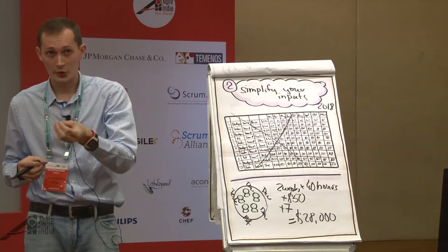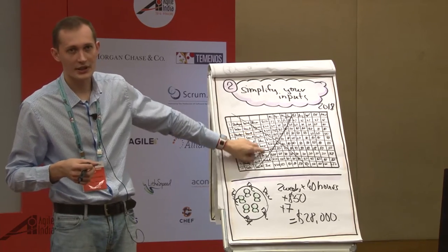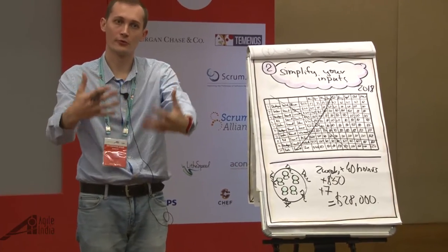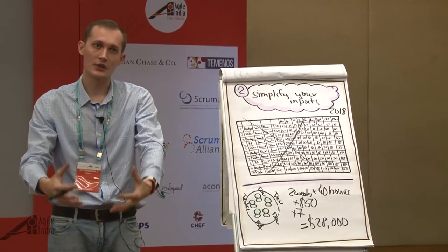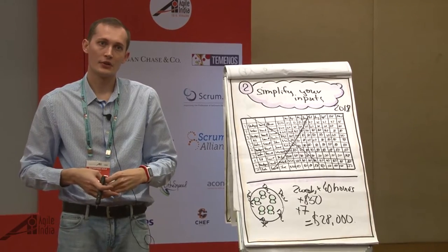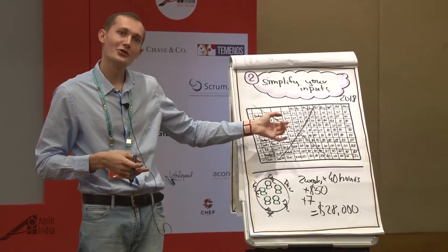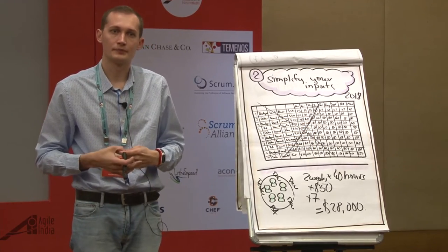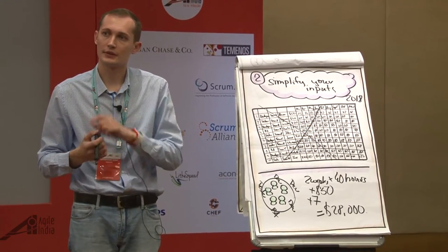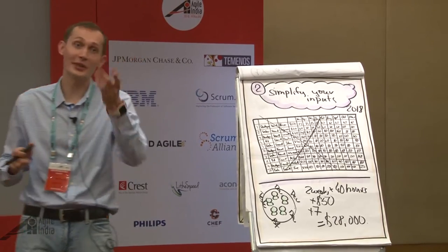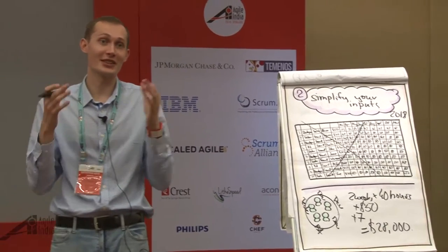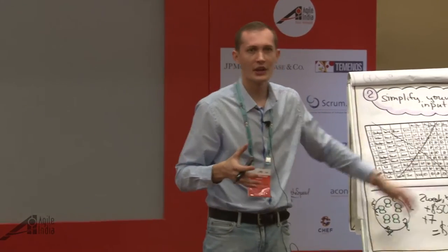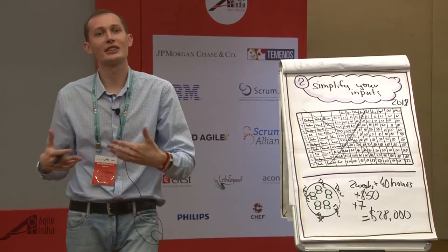If you break it down too much detail, it starts losing accuracy. You create rounding errors which accumulate and give you a false impression. All you need is how much my sprint costs — not how much my project costs, how much my sprint costs and how many sprints can I fit into my budget.